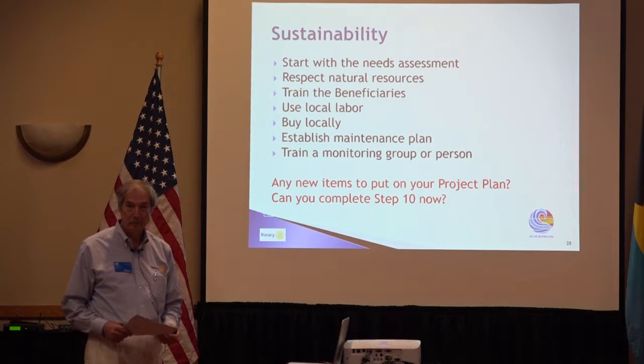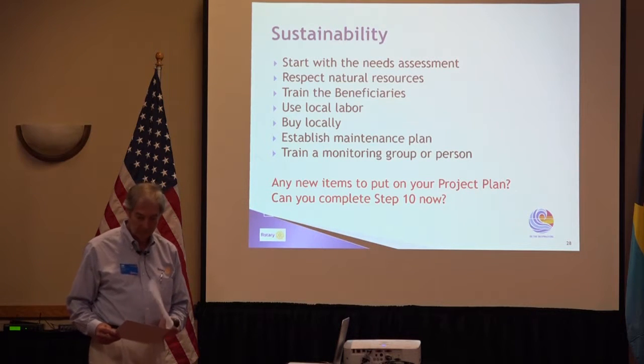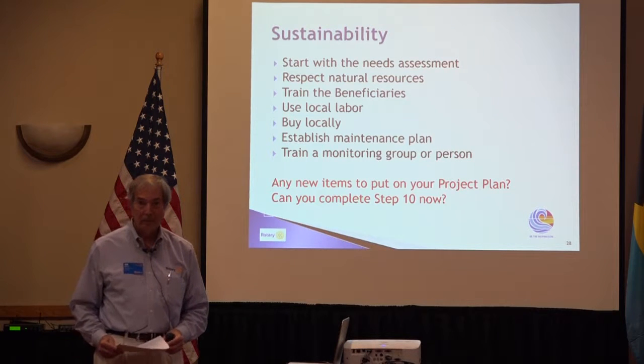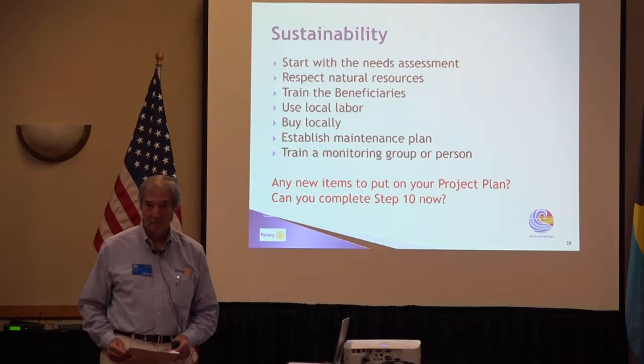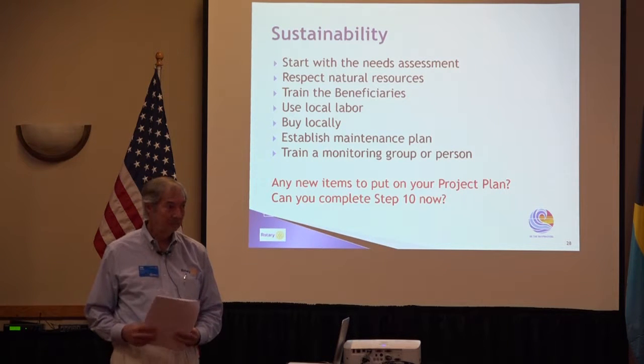Another thing, while you're on this topic, I've just retired from a civil engineering company. Western engineers like to go to the third world and over-design. Absolutely. I've seen projects fail for the lack of a 15-cent control fuse that they couldn't get to put in because the engineer that designed it didn't take these factors into play. Literally shut down a project over a 15-cent fuse. Wire stripping.